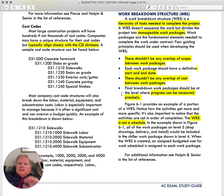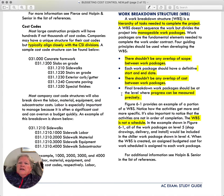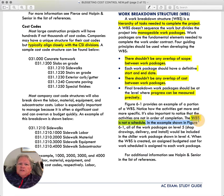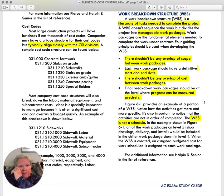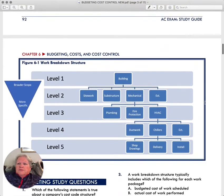The construction business is all about monitoring progress and being able to measure results. It's a very quantitative industry — it always comes down to: can you track what's going on, can you project what your final costs are going to be, and are you on target to meet your original budget? It's also important to understand that work breakdown structures are not a schedule. They are simply a way to organize, and you use them in both budgets and scheduling.